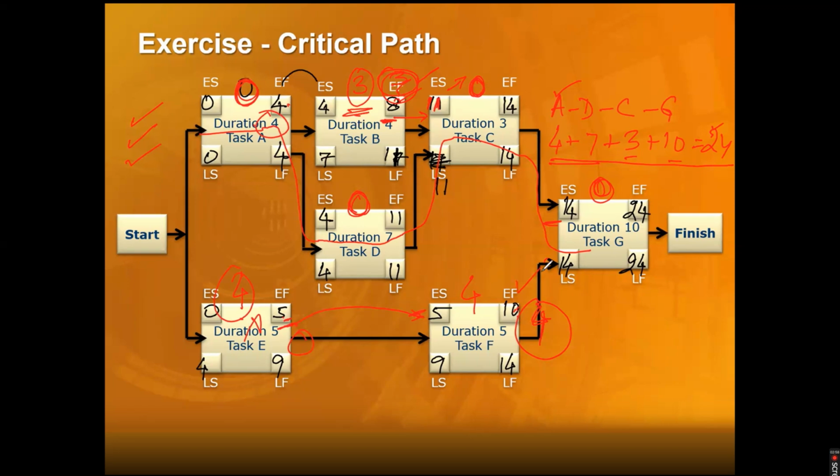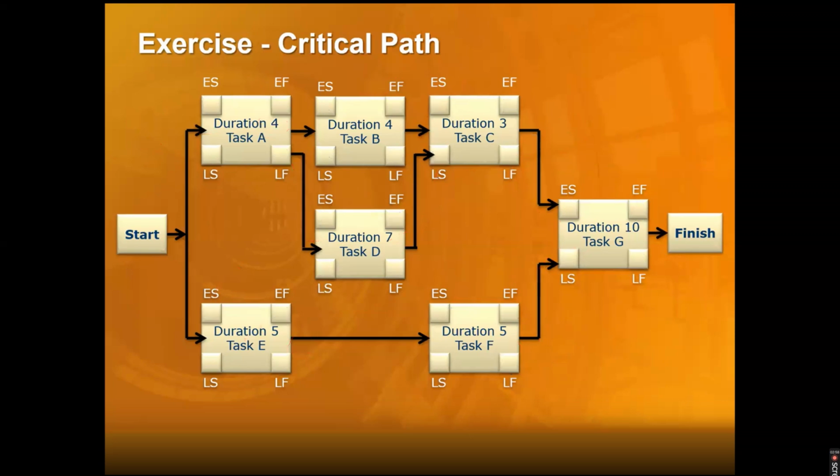I hope it's clear to everyone that the free float is the amount of time that you can delay an activity without changing the start of the next activity. So you may have a total float, but you may not have a free float. It's absolutely possible. So this is pretty much just a quick recap.